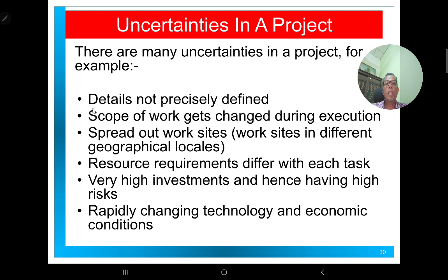In some cases, previously you thought the job or the activities could be done by maybe 4 people. During the execution, you found out that 4 people is insufficient. So you might want to speed up the activities by increasing the number of people who work on that particular activity. So the scope of works also changes, and the number of people can be increased or changed.